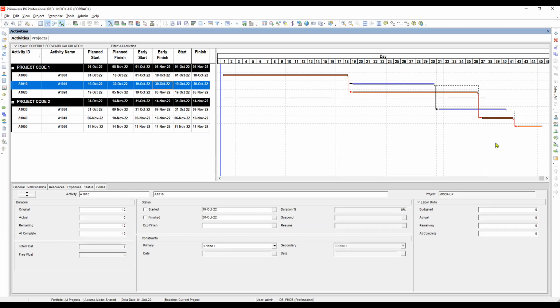Okay. So that means this is the forward calculation, because the calculation will start from here down to the required completion date. So that means early start from here plus the duration, early start plus duration, up to the completion will give you the forward calculation, which is the 45 days to complete the project. Okay. So I am talking now only for the forward calculation of the schedule.